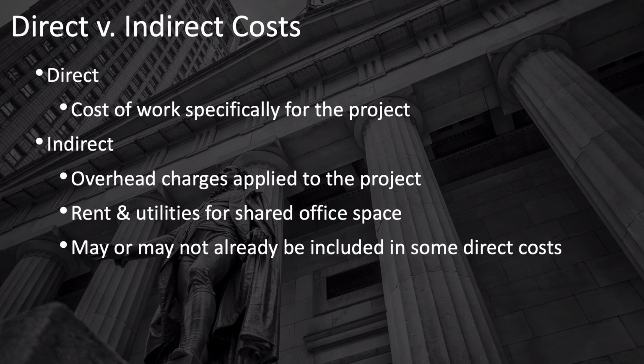You may also have other overhead charges to your project. Suppose your organization has a project management office and an HR department that serve your project indirectly, along with all of the other teams in your organization. A portion of their costs could be applied to your project as indirect costs. As you can see, figuring out all of these indirect costs can take a little bit of time and effort. Whether or not your organization applies indirect costs to projects depends on your organization and how they measure and manage these indirect costs.